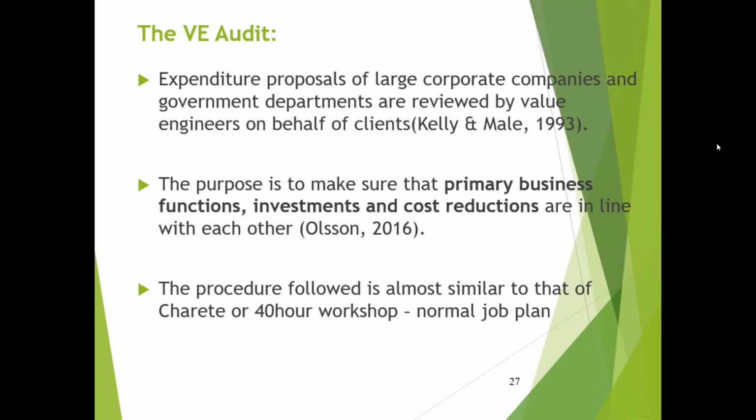So here also a normal job plan is adapted, similar to that of the charity. The charity was a 2 days workshop, and here, of course, it can be a 2 days workshop or a 40-hour, 5 days workshop.